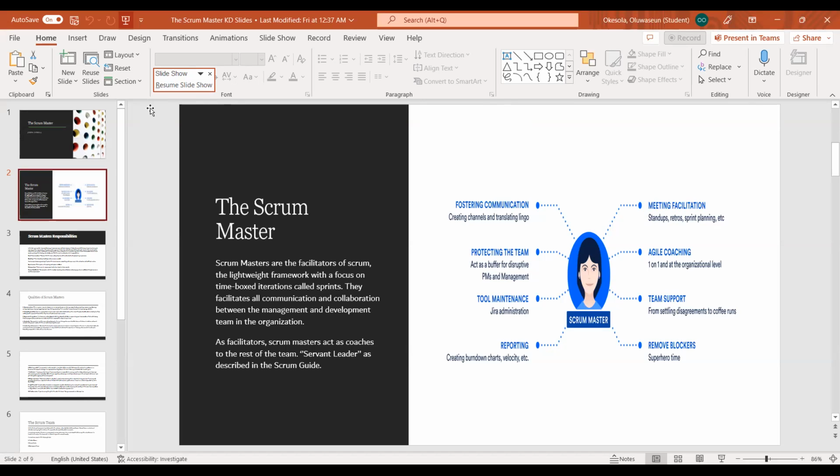maybe there's a task that a particular developer is supposed to deliver on, and the Scrum Master looks at this person and knows, okay, so this person is a lady and she's obviously pregnant, and her pregnancy is kind of heavy at the moment. So it is the responsibility of the Scrum Master to know that. So this is going to be a blocker, because at the time we should be delivering on this product, this person might just be on her way to making a baby. So the Scrum Master wants to ensure that he provides an alternative developer to work on that product.